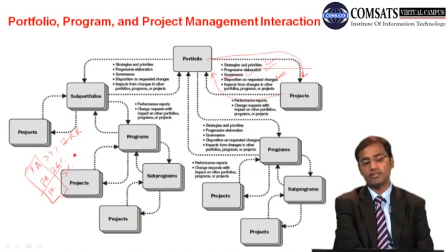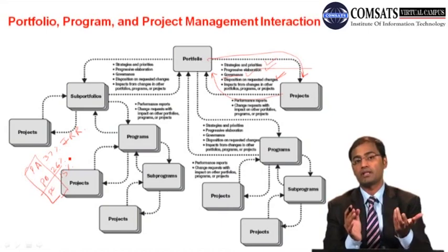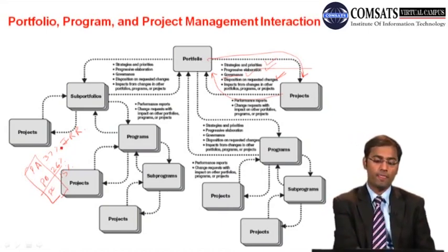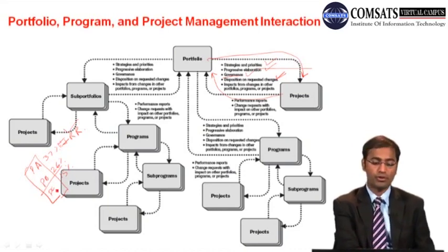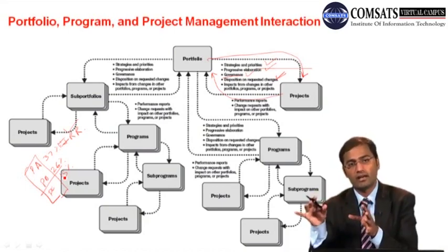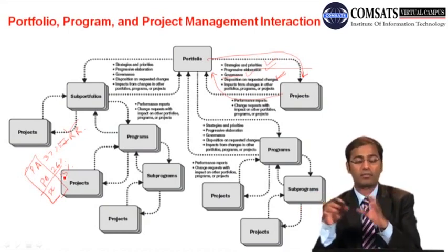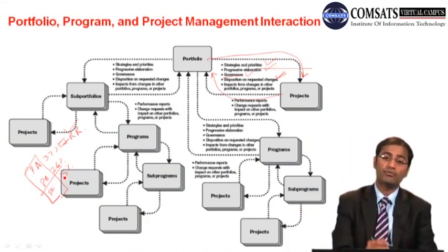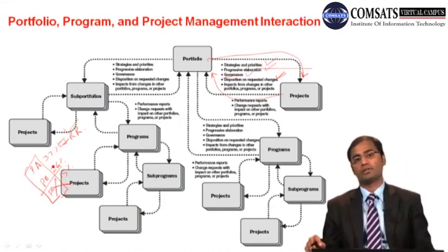The policy of the organization is that we only select projects with more than 20% IRR, financial internal rate of return, FIRR. So project A is fine, project B is fine, but project C is not acceptable because it has a lower financial internal rate of return than specified by the organization. And what should we do then? We won't accept this project.